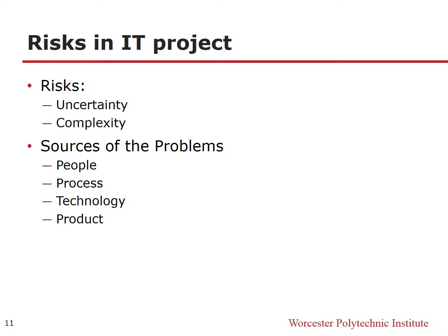The third one is the problem from technology. It's mainly from too much confidence in new technology. And maybe you will think, oh, that tool is great, so you change the tools in the middle of the project. That is a critical issue that can make the whole IT project fail.